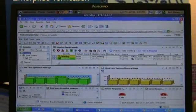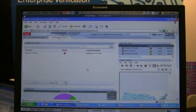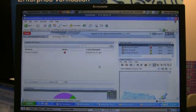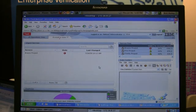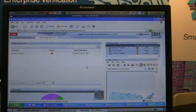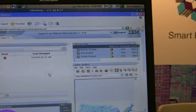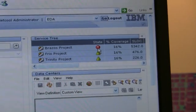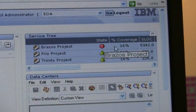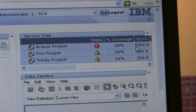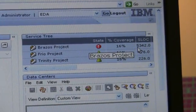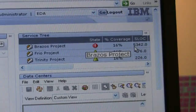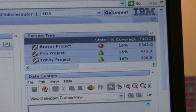Now we're going to go over to our Kivoli Business Services Manager application, and look at things from a chip project manager's point of view. You can see this is a roles-based dashboard, and right away this particular project manager has three projects he's working on, and one of those projects is in trouble. It's indicated by this bright red exclamation point, and the reason this project is in trouble is because we set a threshold for 4,000 source lines of code change — anything above that is a red flag — and indeed this one has had 5,342 source lines of code change, so that created that red flag.